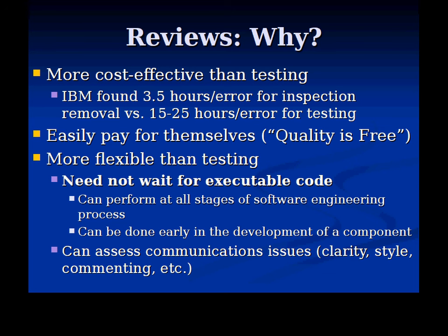We'll be giving quite a few lectures which will try to give you a clue on how you can test more effectively. But the fact is that peer reviews, in the form of inspections, formal inspections, are actually more cost effective than testing. They actually find a greater fraction of bugs than tests. And they find them with greater efficiency in terms of number of hours of human work per error found. IBM has done a large-scale study of this, and it's not quite an order of magnitude, but many binary orders of magnitude difference. In other words, testing requires a lot more effort per bug found.